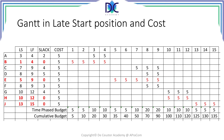When we stretch activity A over 4 periods, the total cost is still the same, so the activity cost per period is now 2.5. So per period we will have 2.5K for activity A — giving us the same total cost for the activity. The same applies to task F.